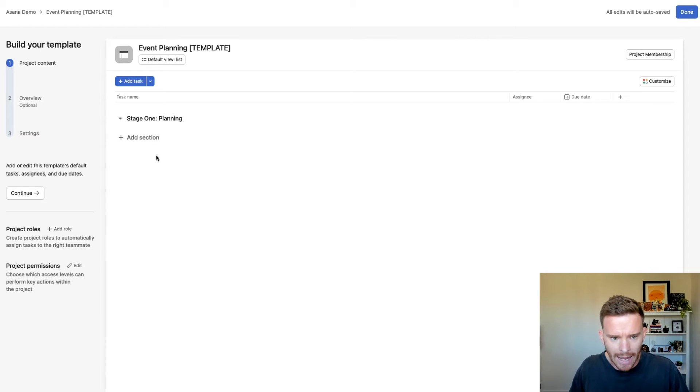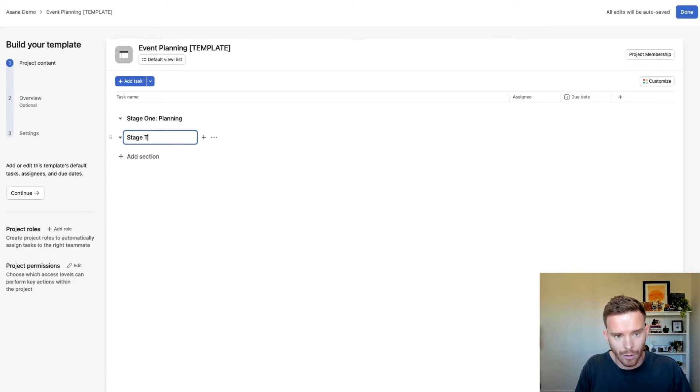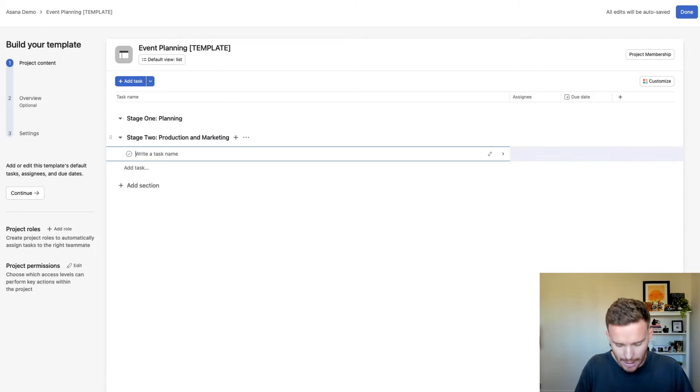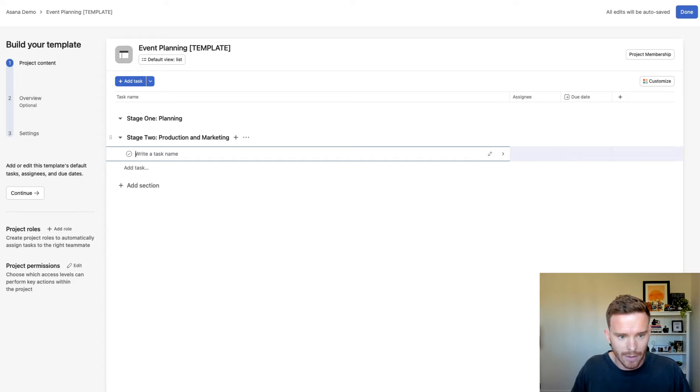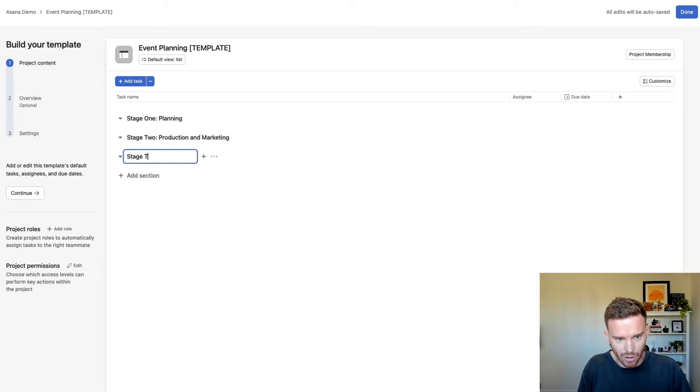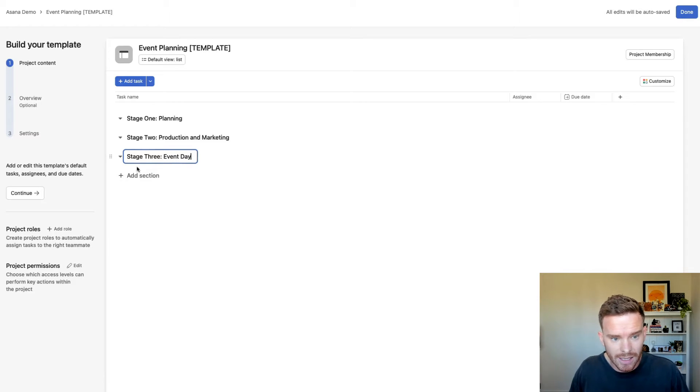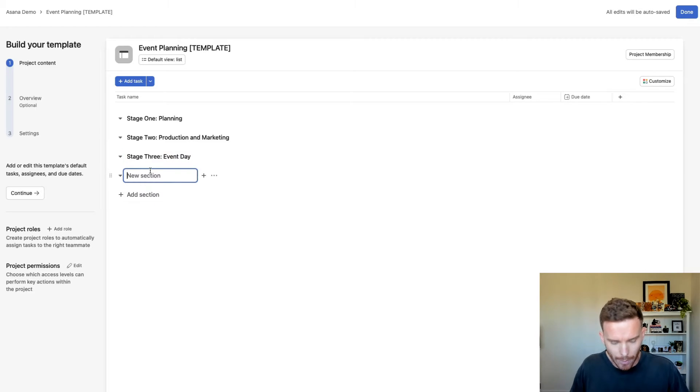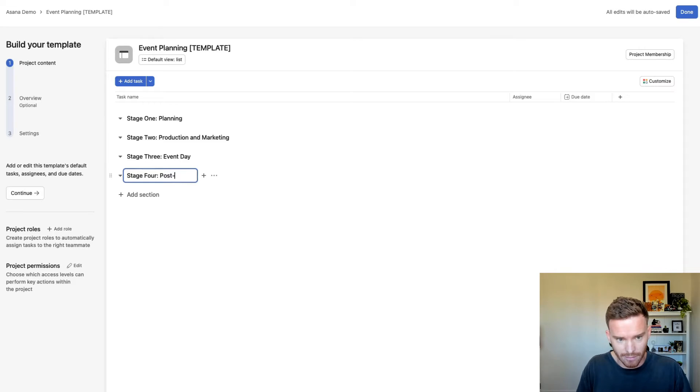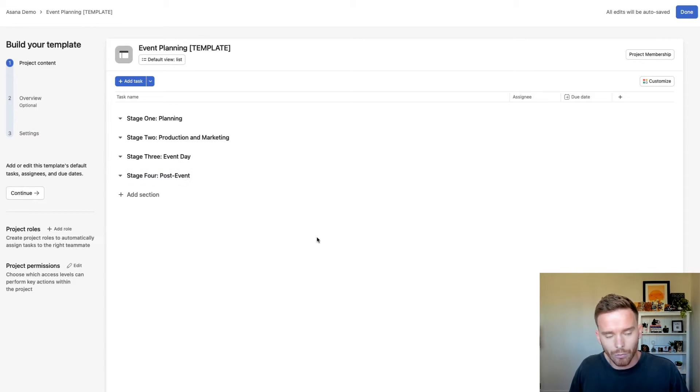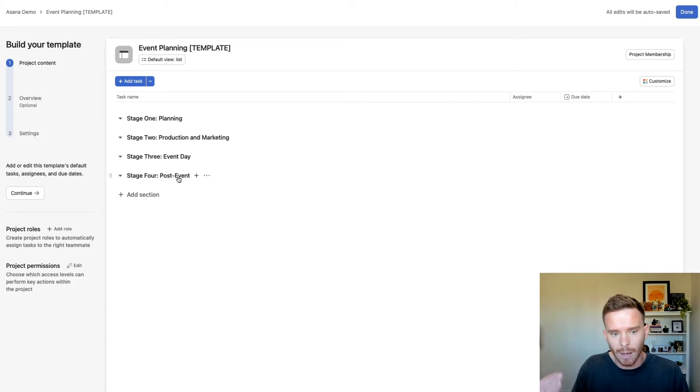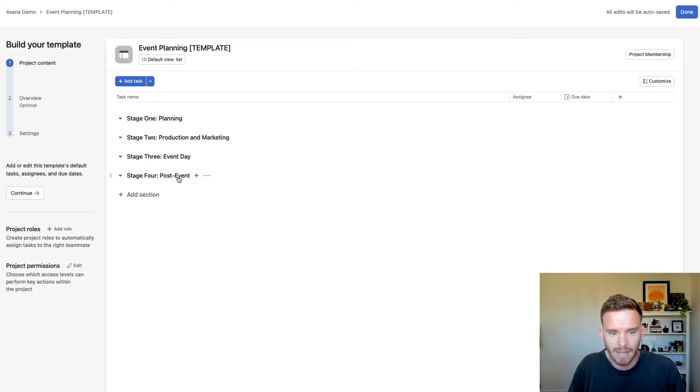Then I might have another phase or stage for production and marketing, and then for my event we might have another section for stage three event day tasks, and then we might have stage four post event tasks.